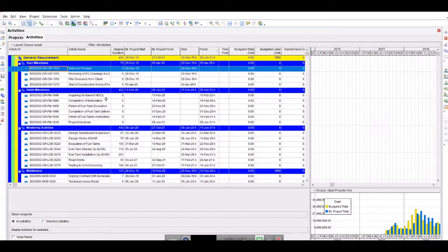Now, how we will proceed in this video, we will see there are 2 cases. First case, you are using the portfolio analysis for your past projects or ongoing projects. Maybe you don't want to change the activity ID. If you want to change the activity ID, I will suggest for future projects that when you make the activity ID, always put the project code there, be it B1, A1, C1, whatever the project code is, at least put it in the start, so that the activity IDs are unique at portfolio level. Activity IDs are always unique at project level, so in order to make them unique at portfolio level, just put the project code in the start. It can be 1 digit or 2 digits to distinguish the projects' activity IDs.